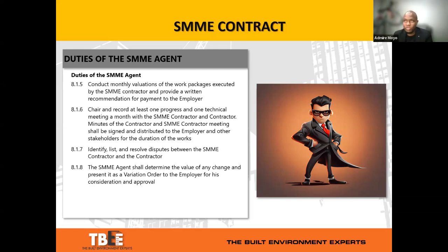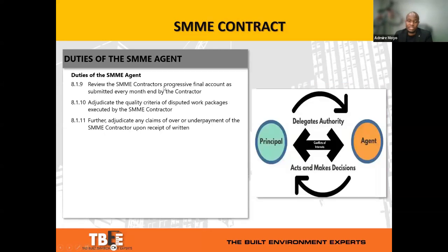So here we were quite purposeful as well to mention the term variation order, because most standard forms of contract don't actually specifically refer to a variation order. It's either an instruction or a change order, or whatever the case is. But the disjuncture then comes in where mostly quasi-state entities or perhaps private clients refer to that aspect as a variation order. So we thought it befitting to actually align the two.